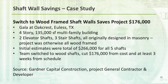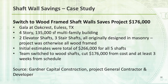Just to show one example: a multi-story project in Texas that Woodworks helped the design and construction team with. The project had five large shafts — two elevator shafts and three stair shafts — and came in over budget. They identified that switching the shafts from masonry to wood might save costs. At the time, the design team wasn't fully familiar with the code allowances. We helped them understand the code side of things, and they were able to cut about $175,000 off of the construction cost just by switching the shaft wall materials to wood frame, with positive implications on overall construction schedule as well.